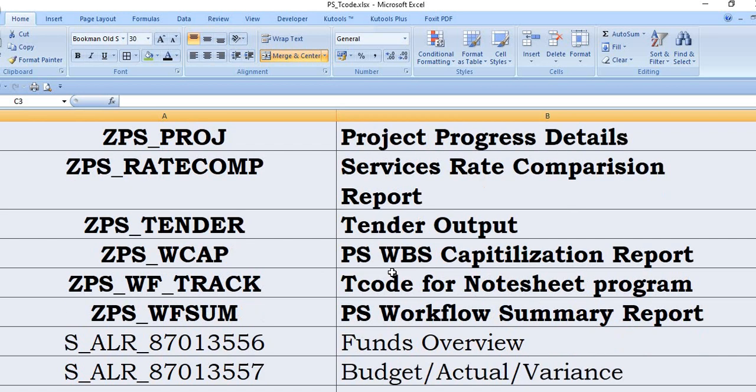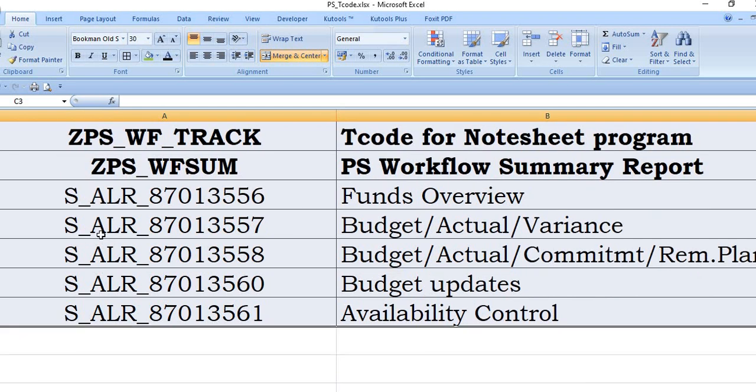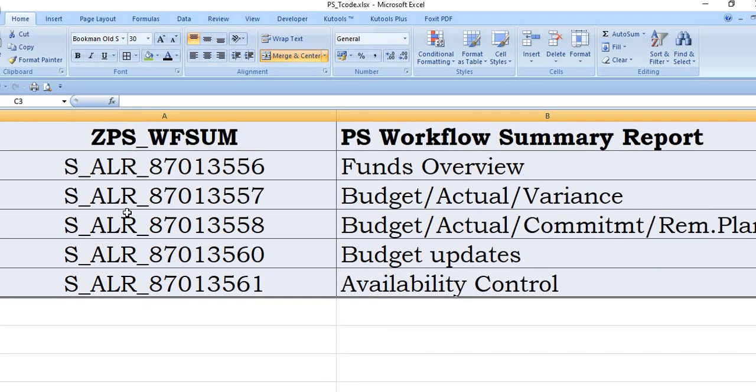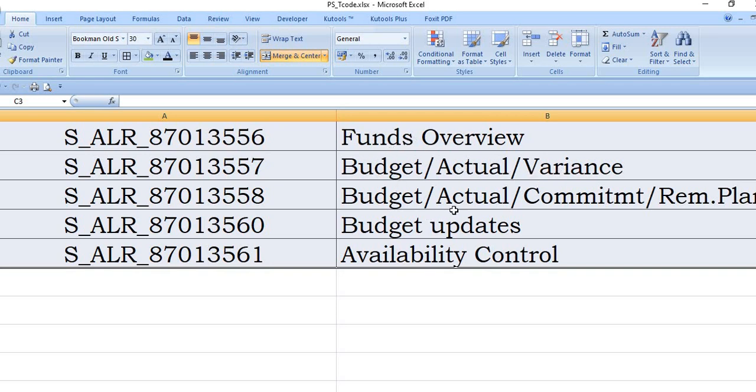And ZETPS_WF_SUM for the workforce summary report. And these are the general standard transaction code S_ALR. These are the transaction codes you can note down for your summary and you can save in your favorite list. Fund overview budget actual variance, budget actual commitment and reminder planning. For this you can get the budget updates in your project and for this transaction code you can get the availability control.